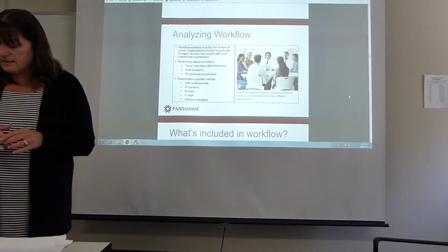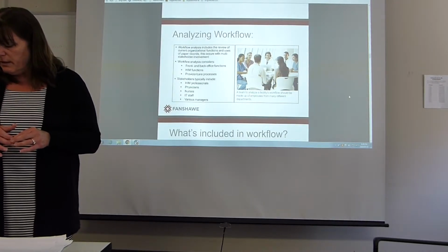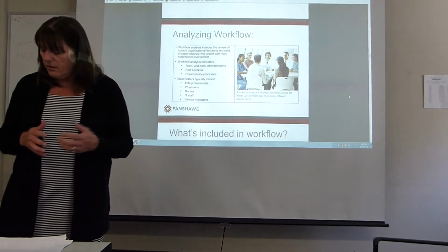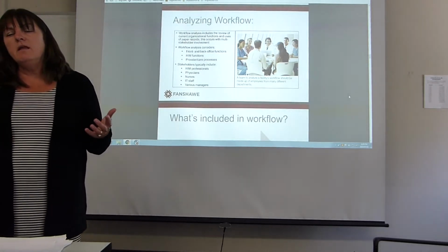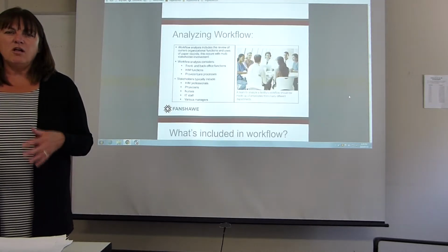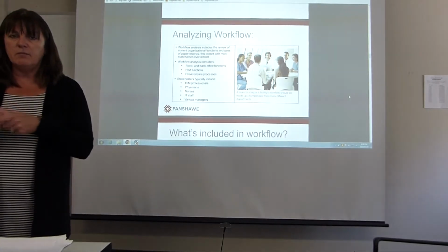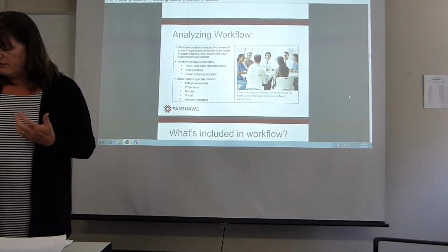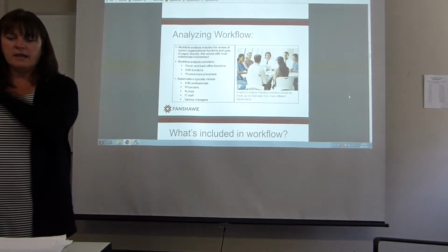So this is done, as I said, step by step. Who and what roles write on the paper? What does the individual do with the paper? Who touches the paper? Are there variations in the process? Are there times when the process gets stalled because I'm waiting for somebody else to give me something before I can move that paper forward? So does it ever get bogged down? Does it ever get stalled? And how long does the process take from the beginning to the end?